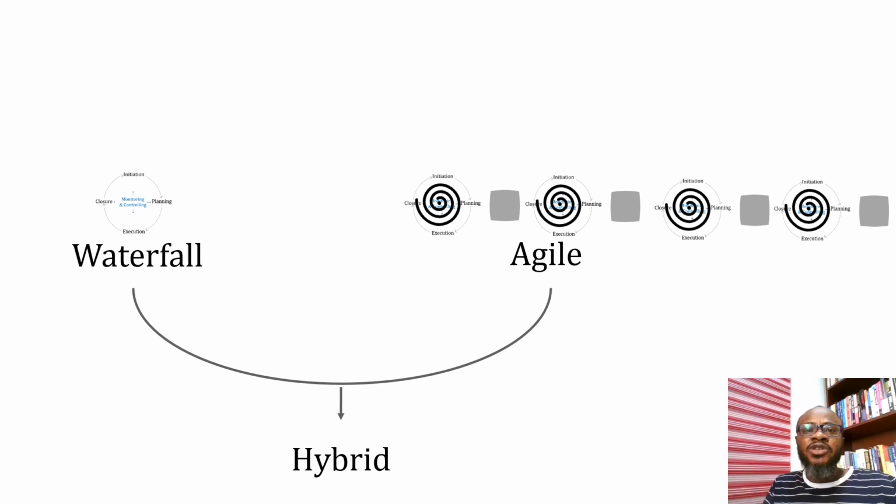And then move on to the next component, engage all the trials and experimentations, go through it, maybe one iteration, two iterations, whatever, get it right, and release it to the client, and then engage the next component. So you could see that Agile as a methodology is a combination of the iterative life cycle and the incremental life cycle.